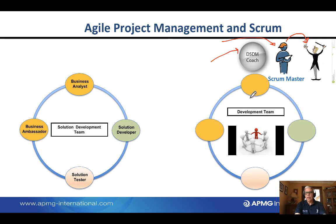What we suggest you say to the team is, there should be somebody within the team who takes on a business perspective. So somebody should be out there, perhaps liaising with the business outside, but bringing the ideas to the team. So you have a role in defining what the solution should look like. There should be somebody in the team who is then creating the solution, and then somebody should be testing to make sure what is being asked is done. So the person who defines it, of course, can take on the role of a tester as well.